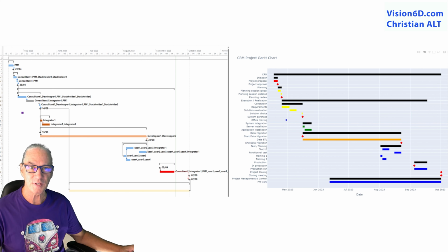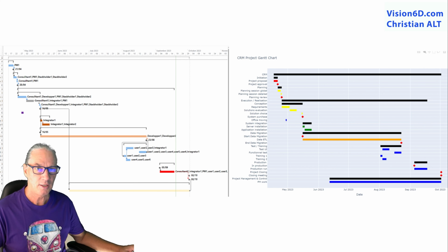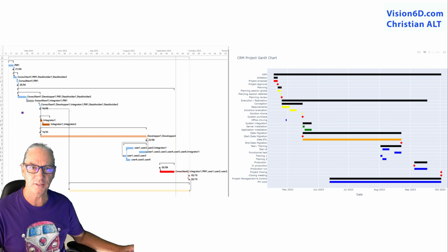We can say that concerning the task names, their duration, start date, end date, it is exactly the same in the two representations. Going through several iterations, I've also added those red diamonds that represent the milestones, that is to say the events of zero-day duration.